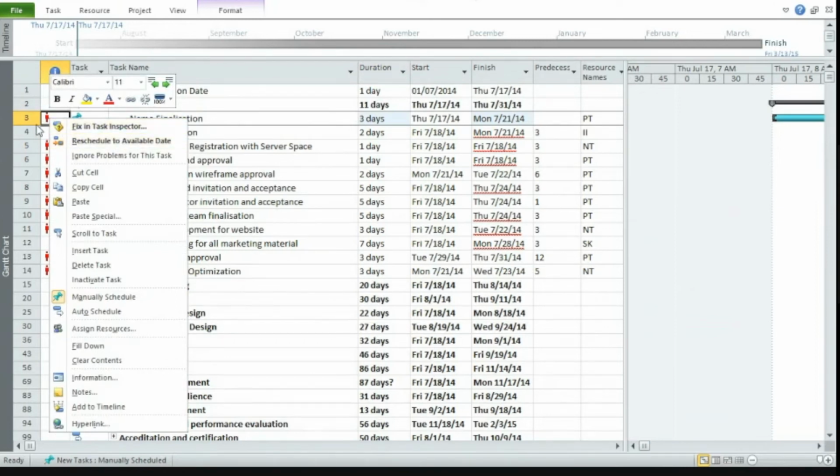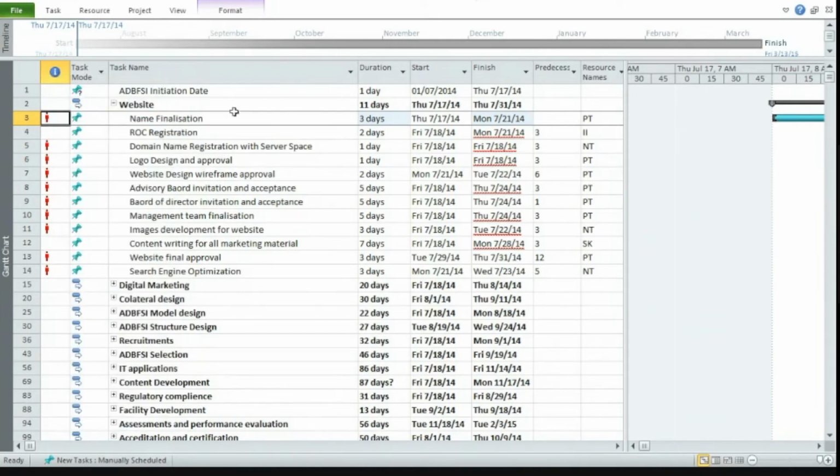It tells you that the person allocated to this, that is PT, is overloaded, because the task allocated to him is 3 days and he has already been allocated on the 2nd day and 3rd day. So how can one person do 2 days' work in 1 day? That is why it says it cannot be done.